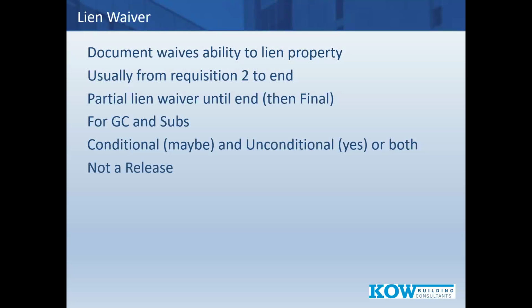Also remember, this is not a release. A release is rare and releases someone's ability to claim funds. A lien waiver is just waiving the right to lien.